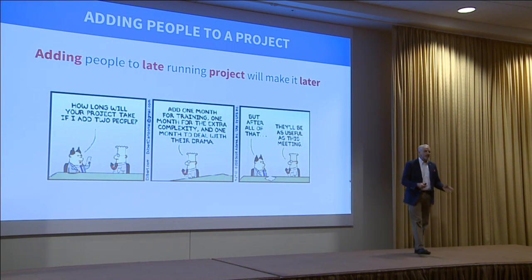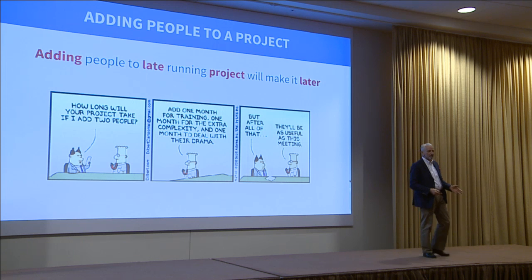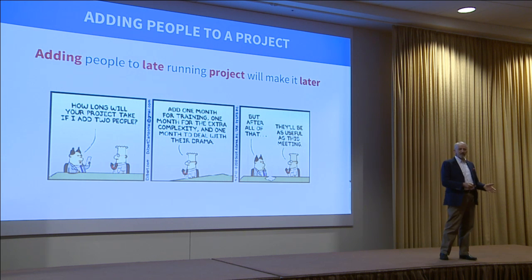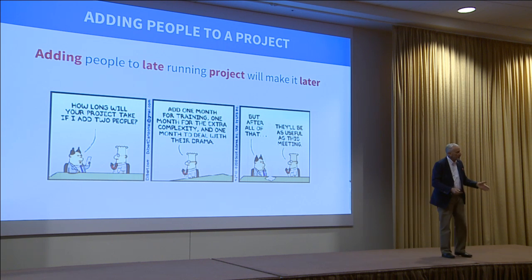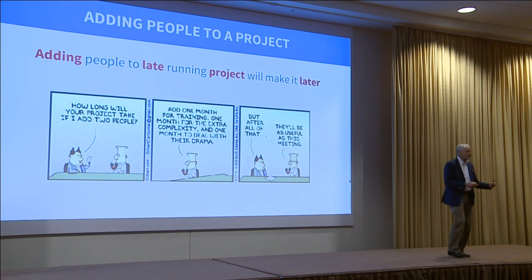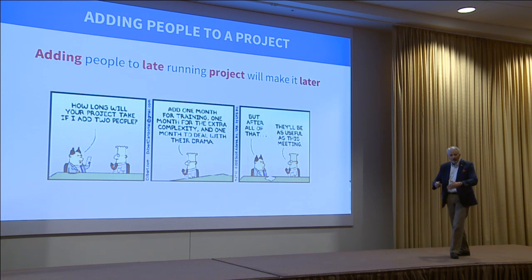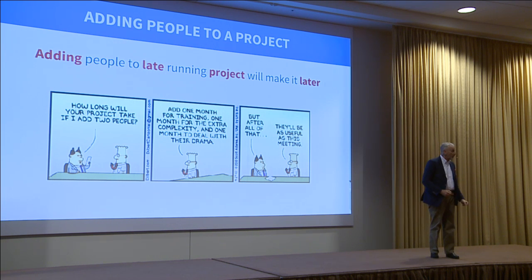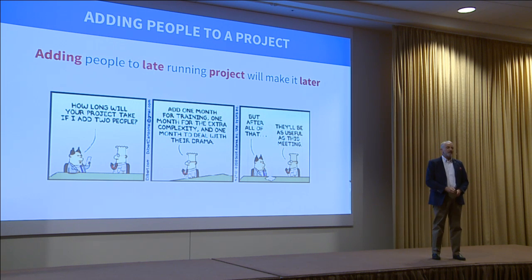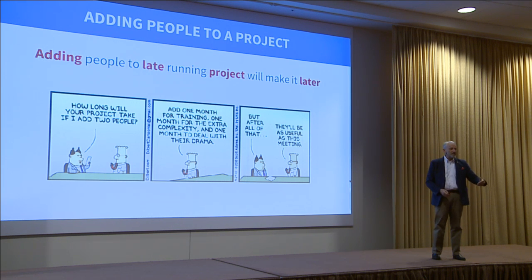Adding people to a late-running project will make it run later. If you're running out of time and you think 'let's get some help,' it will actually be longer because you have to teach them what to do, how to behave in the project process, and perhaps about the code you're working on.